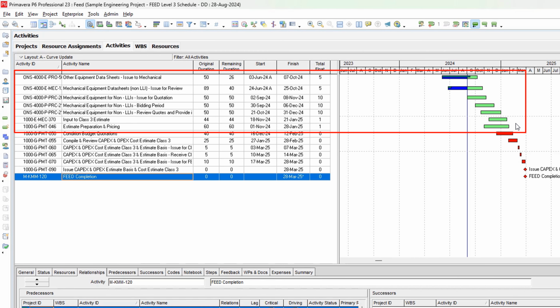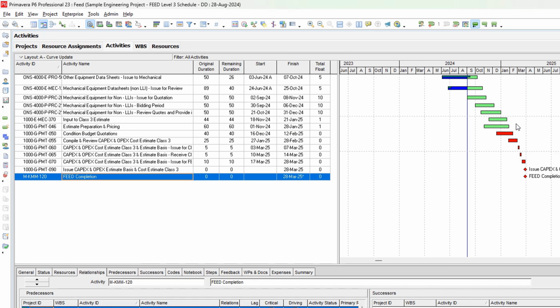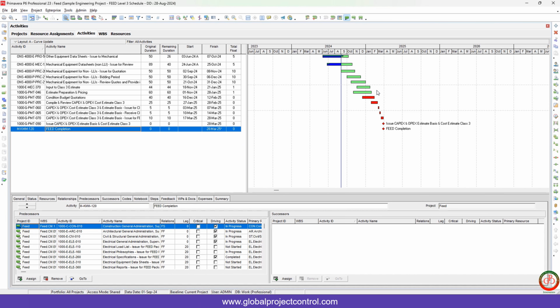The top 7 activities are not located on the critical path. As you see in the Total Float column, those are not on the critical path because we have some total float for those activities. But if you look at the total float, the amount is not too much. So we can consider those activities as near-to-critical activities. But this is not represented perfectly right now. How can we manage it?